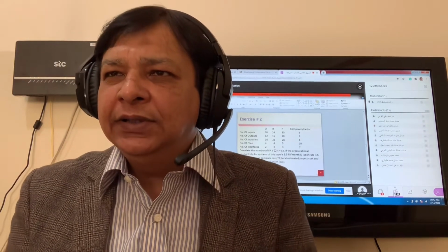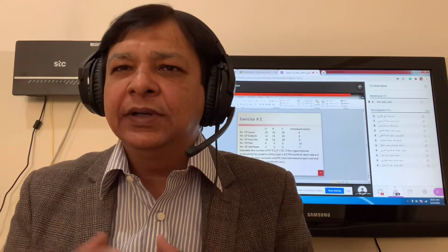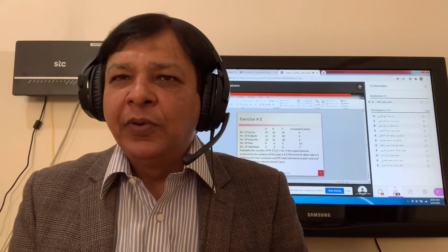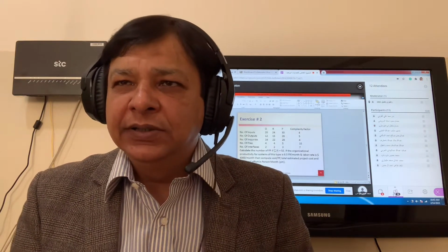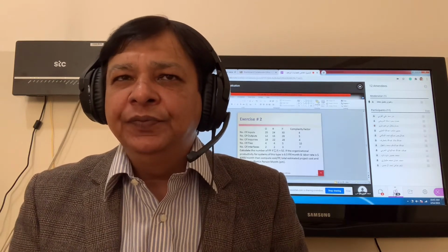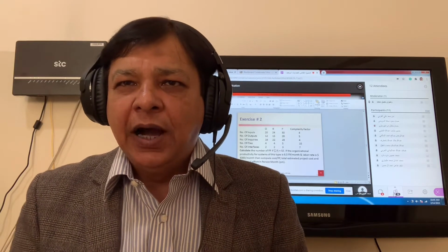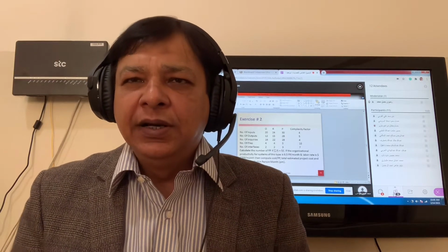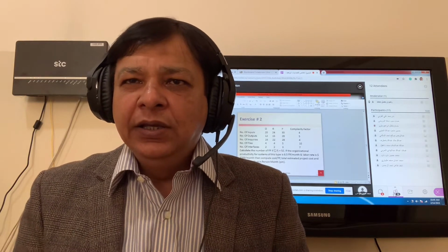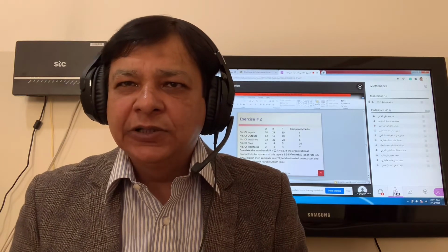Now, what are the disadvantages, the constraints of function point? In terms of accuracy, it depends on the expertise of the project manager or system analyst. The calculation of inputs, outputs, inquiries, files, and interfaces, and the optimistic, realistic and pessimistic values, vary from person to person, expert to expert.